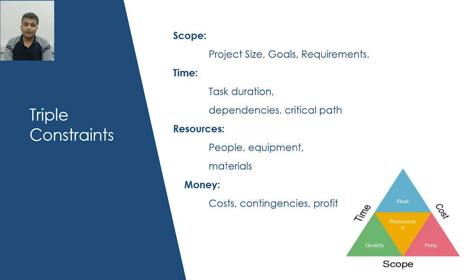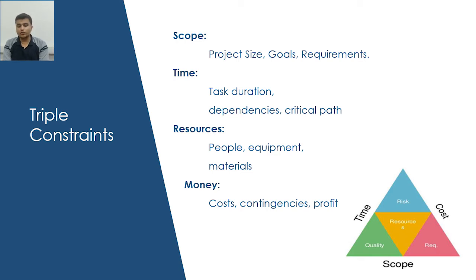Next topic is triple constraints. Different project management tools are available to perform this traditional approach. Any project revolves around three main basic factors which are most essential for project management: scope, time and cost. Scope includes project size, goals and requirements. Time includes task duration and dependencies. Cost includes cost, contingencies and profit. Other than this, resources are also important, which includes people, equipment and materials.